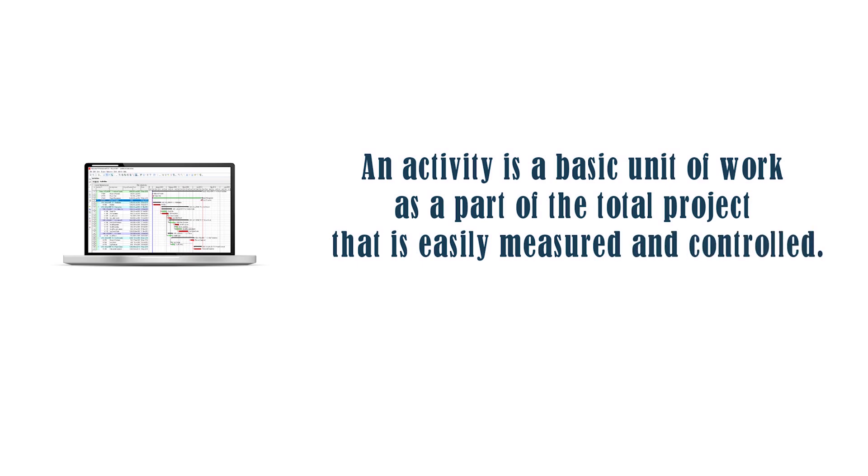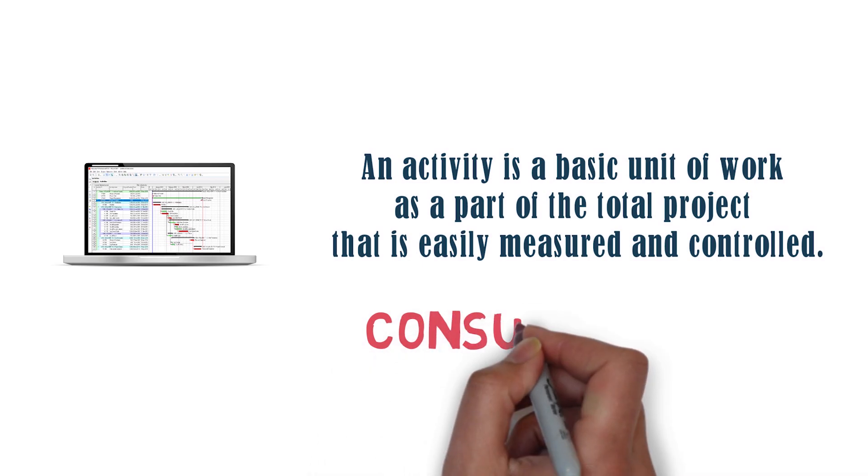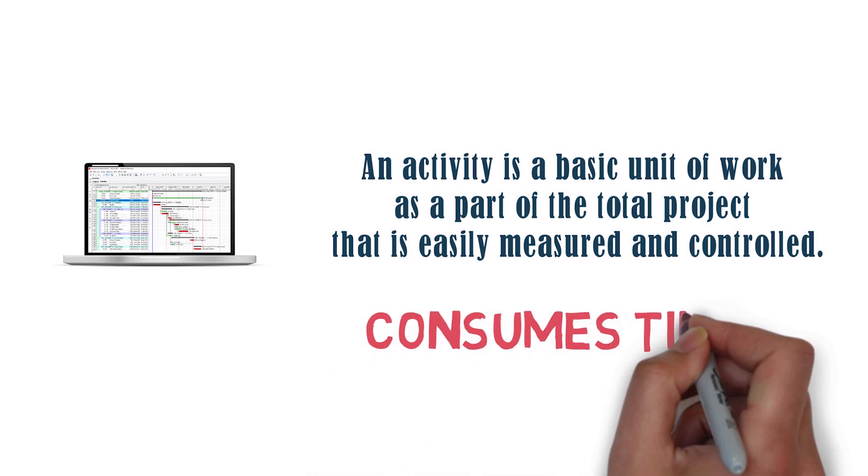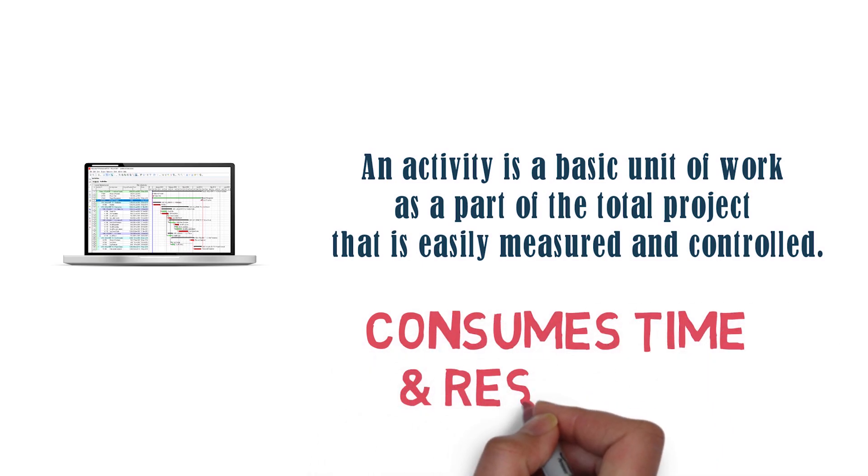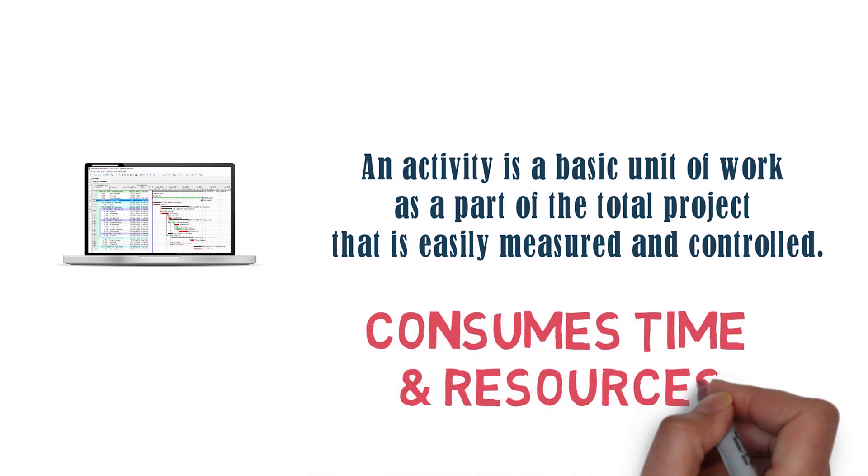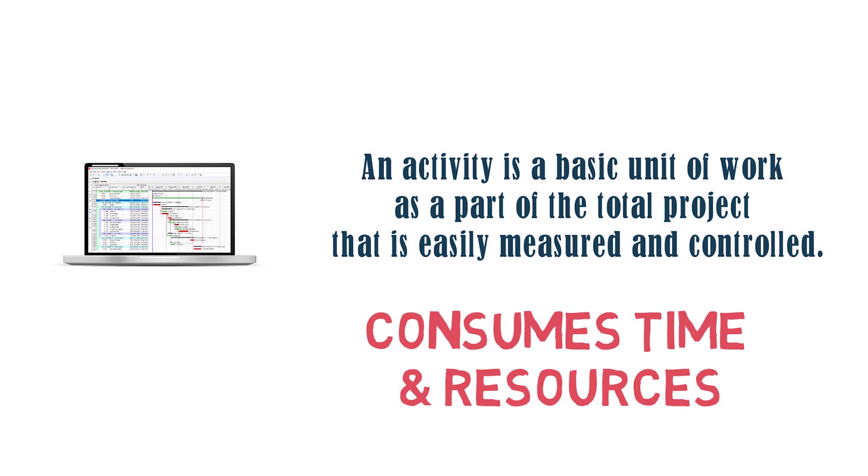But most important thing to know about an activity is it consumes time and resources. The reason it's important is because this is what differentiates an activity from lag, which only consumes time but not resources.